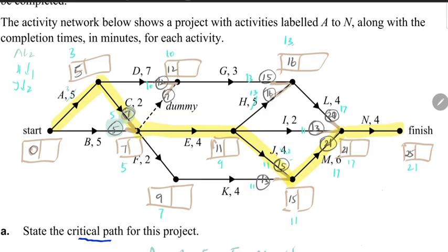So I thought if I reduce 7 to 5, then I can have 5 as my next earliest starting time. So you reduce A by 2, to make it 3, and so 0 plus 3 will be now 3. So that's done a bit of reduction here.